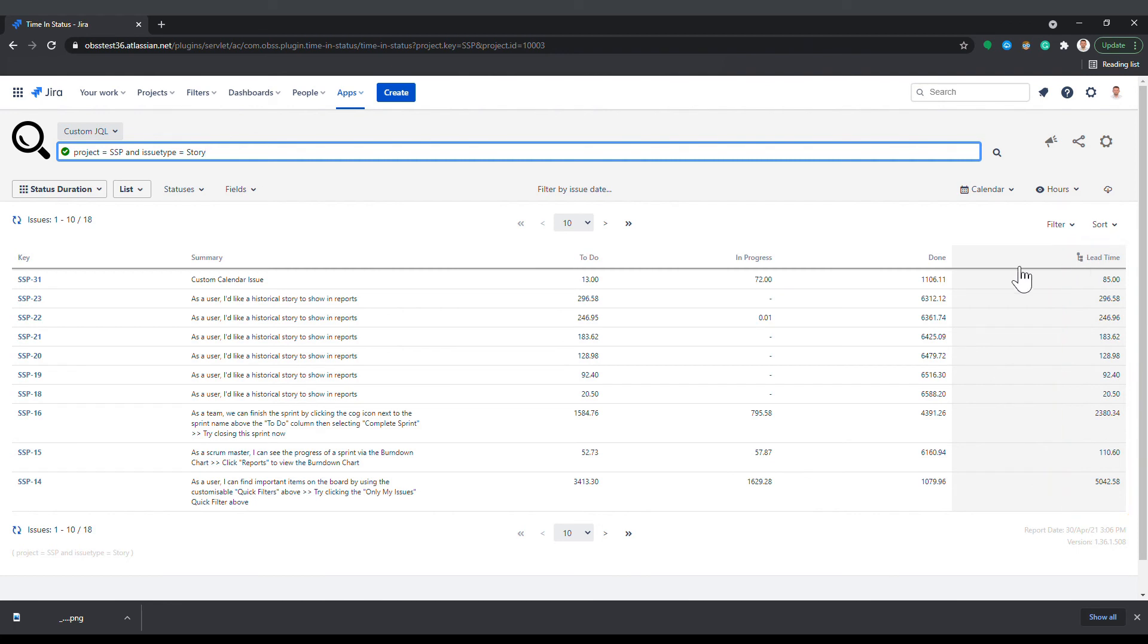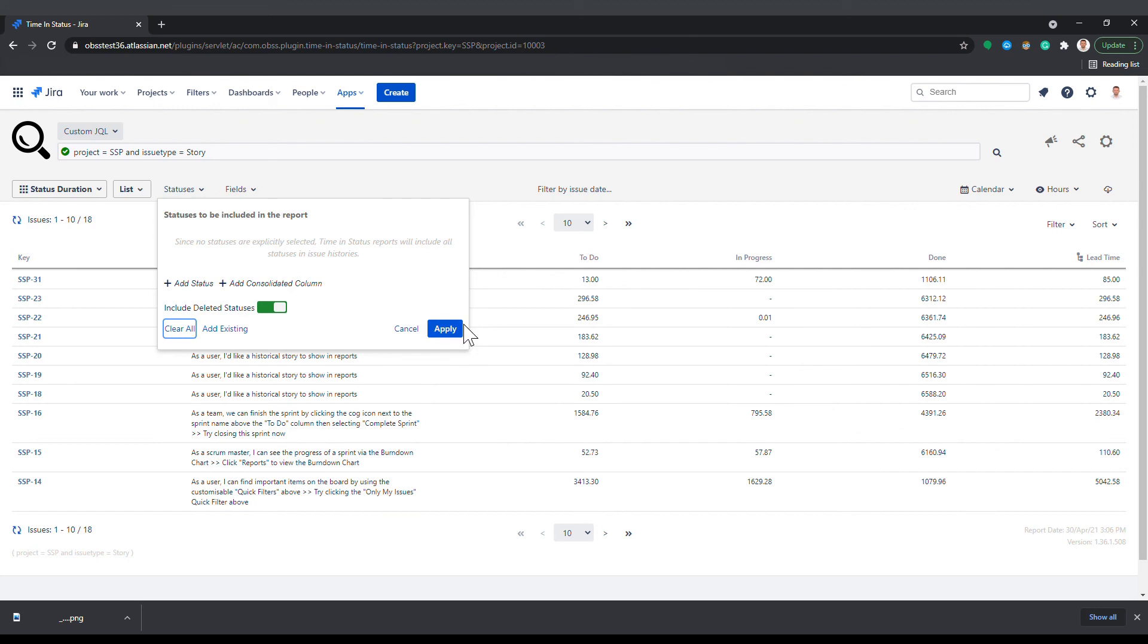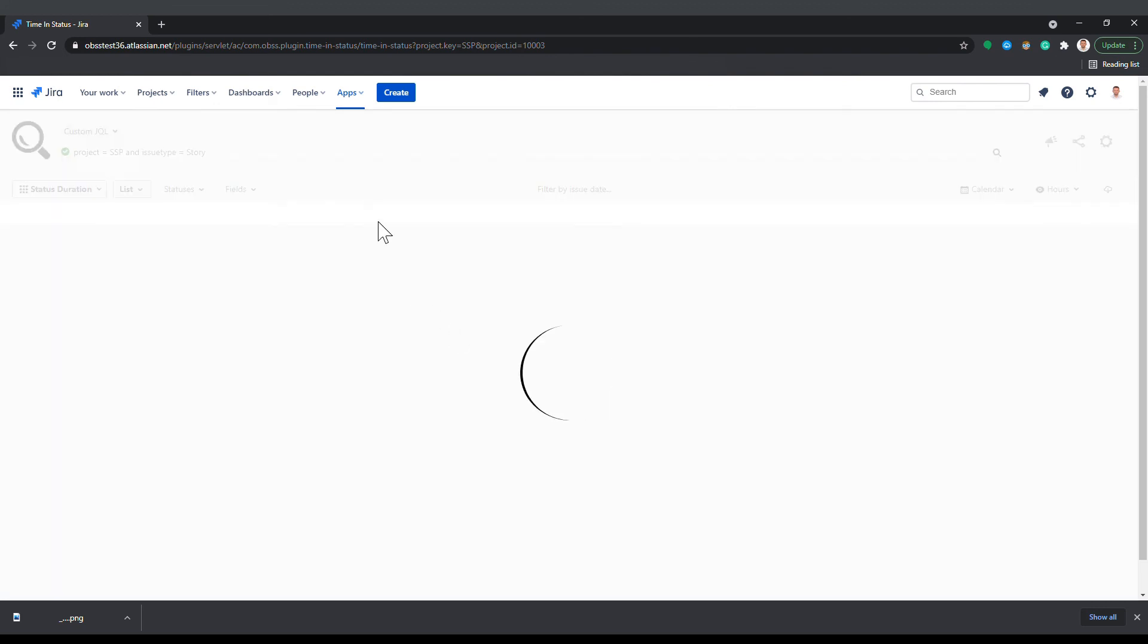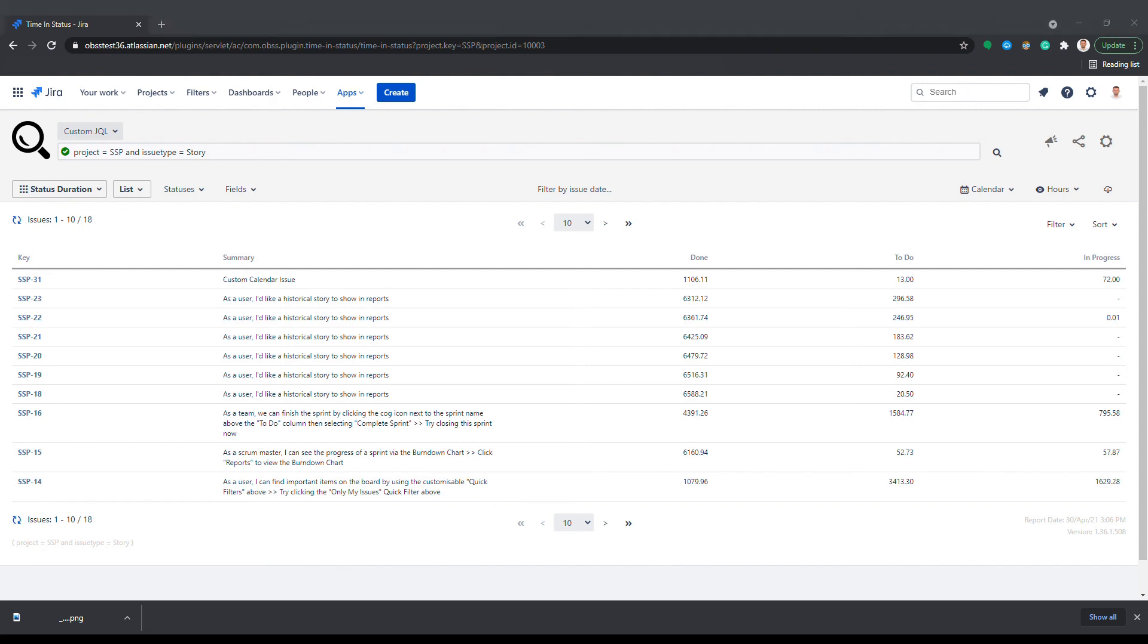Many other report types will also offer status selection, even though the report output does not have columns that correspond to statuses. In those cases, timing status will simply exclude the time from report values that was spent on unselected statuses.